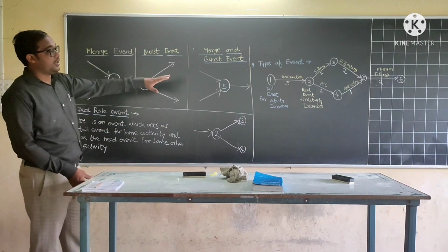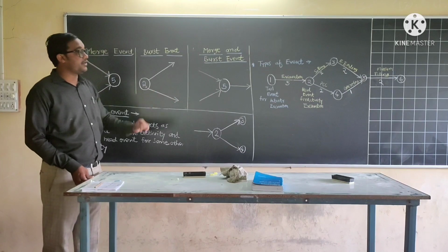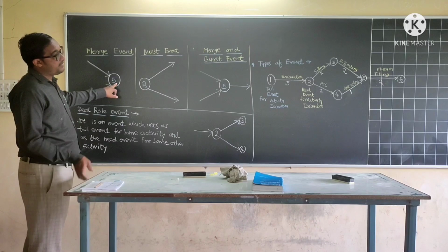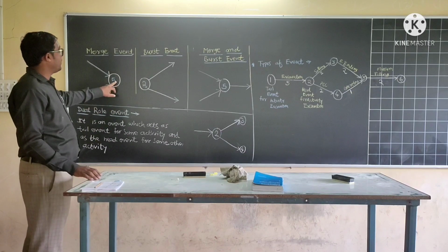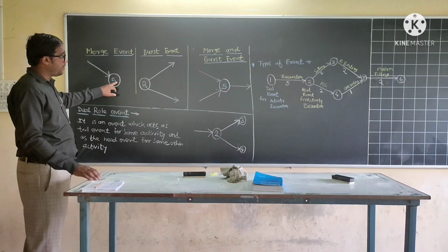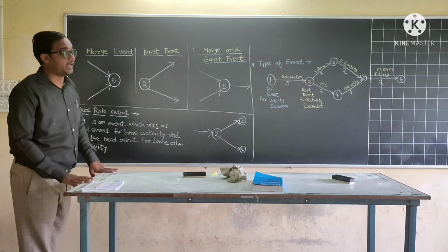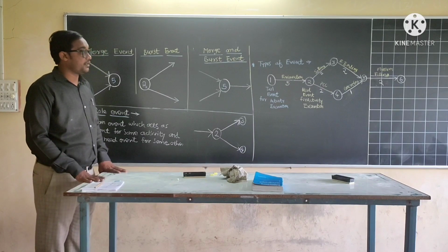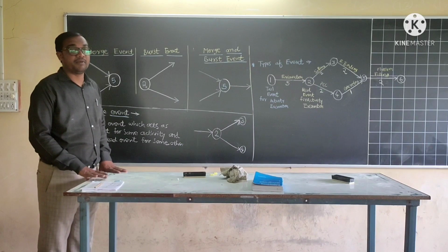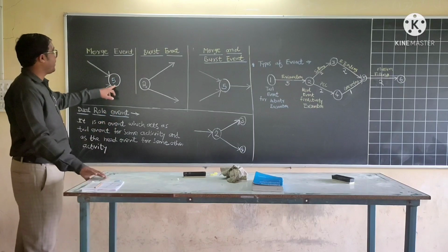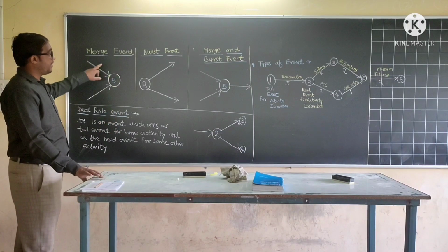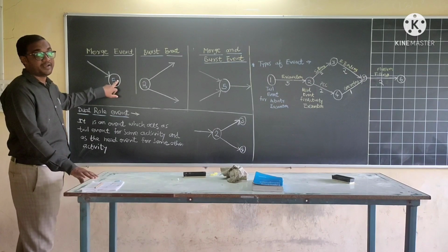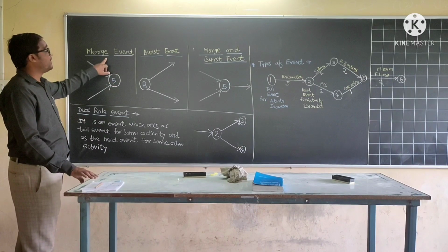Refer to this network diagram. In this network diagram, you can see event 5. At the point of event number 5, two different incoming activities, reinforcement binding and concreting, come and merge into event number 5. Therefore, event number 5 is a merge event. Both the activities, reinforcement binding and concreting, merged in event number 5. Therefore, it is called a merge event.